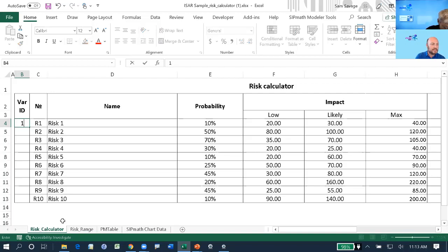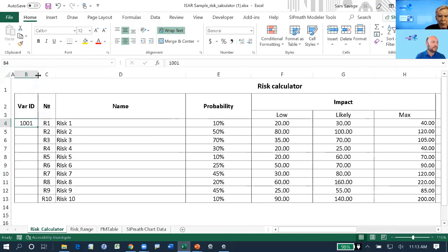The reason we're doing this is that we want each risk to have an independent seed, so they're not correlated. But some of them might be correlated, right? Yes. So for now, I'm going to assume that these are all independent. What if someone else did another risk register? Suppose this involves the price of oil, all these risks. Suppose someone else does one with the price of beans in China. And suppose the two of you use the same variable IDs.